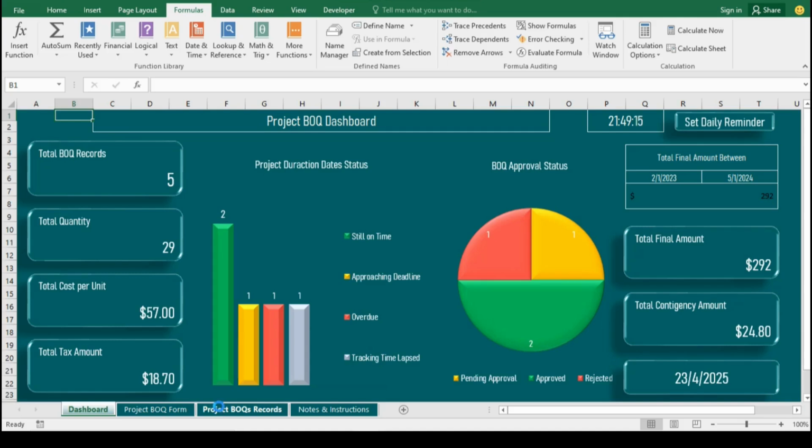With this template, we can calculate the total amounts used or estimated for a given project within a specific date range. Let's change the dates in these two cells and see. The reason it didn't update initially is that our starting year is 2024. If we change it to 2025, we see that it's $0 captured, so it's essential to verify the dates in the table before trying them.